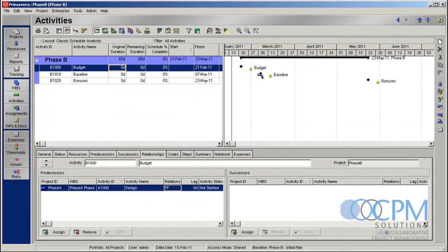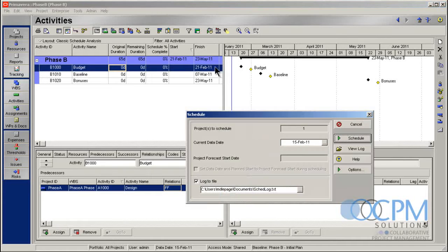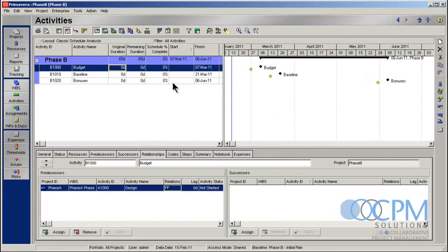To me, these are the same dates that we had before when I had changed things down to 5 days. But if I reschedule this project on its own, what do you think is going to happen? Let's find out. Exactly right. If you guessed, Primavera picks up the changes in the other project, even though it's not open, automatically. So I can control here through the scheduling feature when this project picks up those updates. So this project gets reflected when it's scheduled based on the other project.